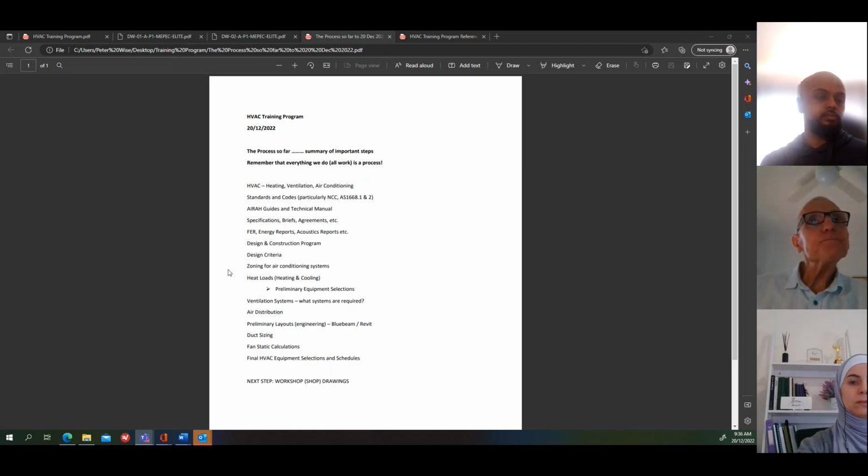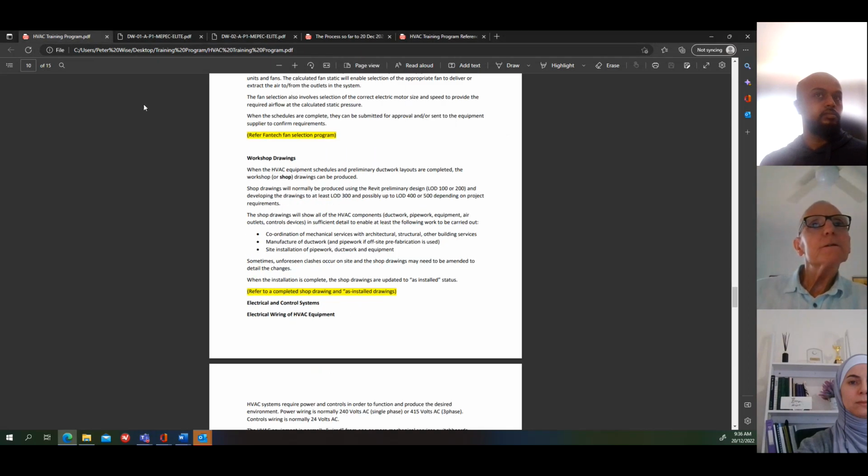So the next step is to talk about workshop drawings. So I've done all these things, and then we go into workshop drawings. So when all the equipment schedules and the preliminary layouts are completed, the workshop drawings can be produced, commonly called shop drawings.